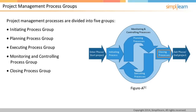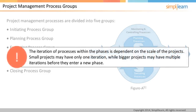The typical project management process in the closing phase releases resources back to the resource pool, so the team members can be assigned to another project. Note that the iteration of processes within the phases is dependent on the scale of the projects. Small projects may have only one iteration, whereas bigger projects may have multiple iterations before they enter a new phase. Project management processes are overlapping activities.